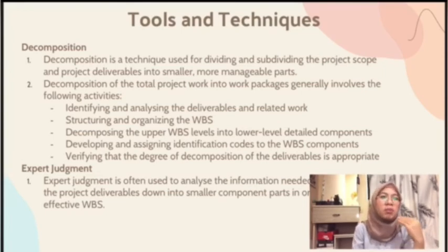Decomposition may not be possible for a deliverable or subcomponent that will be accomplished far into the future. The project management team usually waits until the deliverable or subcomponent is agreed on so the details of the WBS can be developed. This technique is sometimes referred to as rolling wave planning.